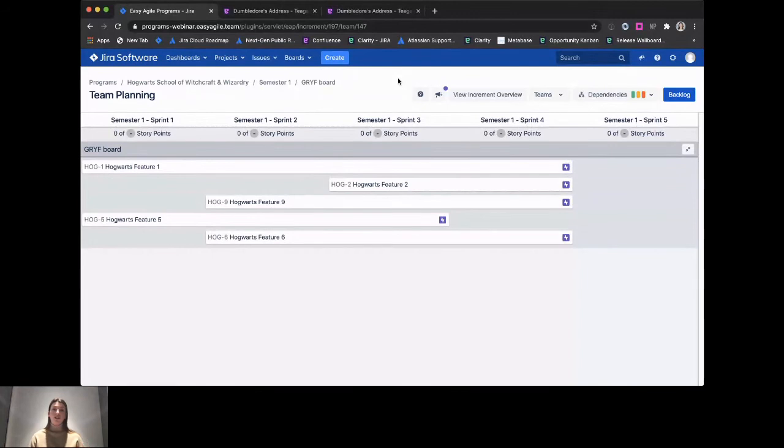And physically what this looks like is a lot of Post-it notes up on the wall. We're asking teams to estimate their sprint capacity, so how much capacity they have sprint to sprint, and this might change if we know that people are on holidays or we have public holidays, for example, so it might vary between sprints. We want to break down the allocated features into stories.